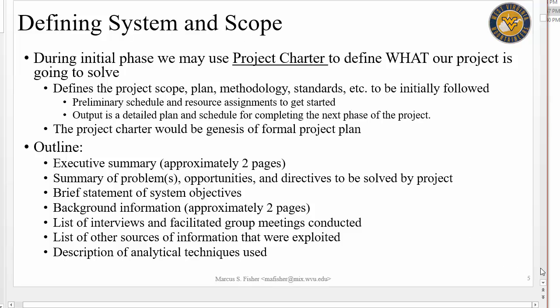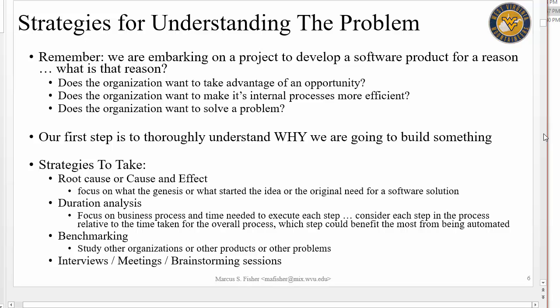Here are some strategies we can take to understand the problem. We can take a root cause or cause-and-effect approach — if we're trying to solve a problem, we need to understand what actually caused it. Duration analysis deals with understanding which aspect of a process takes the most time. You model the organization's processes and attach the time it takes to do each one. You can also do a cost analysis — instead of assigning duration to a task, you assign dollar amounts to understand how much each step costs.